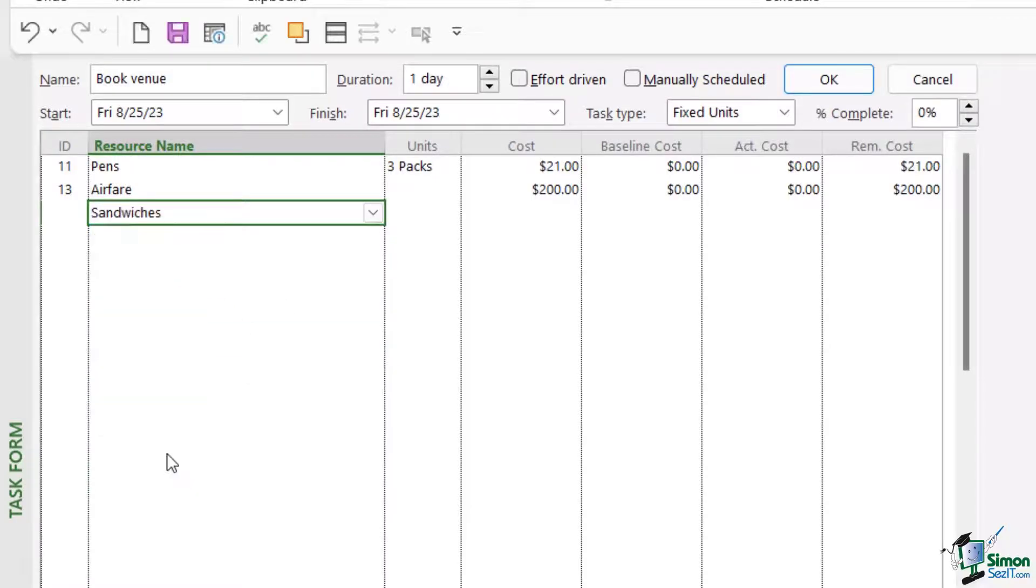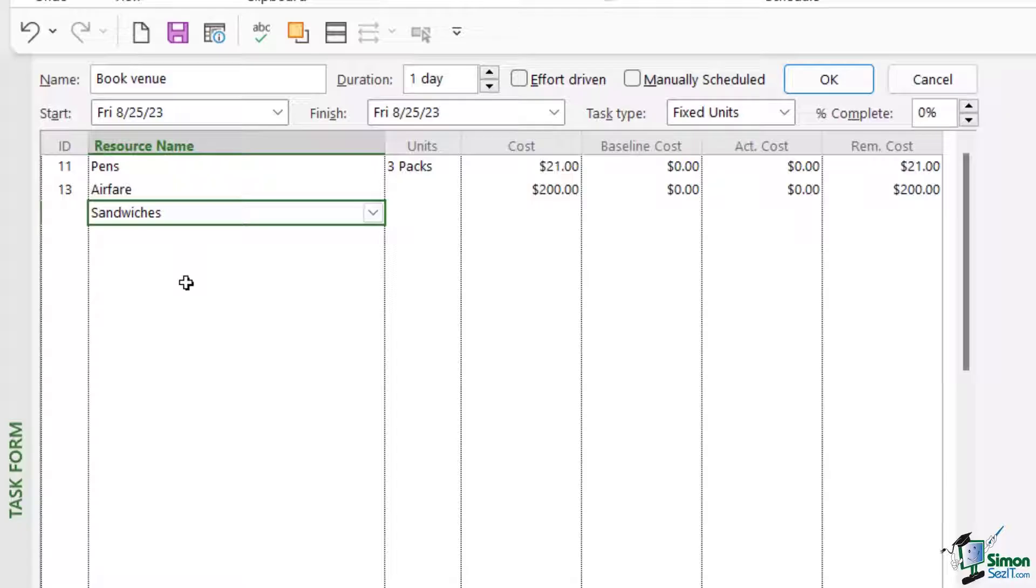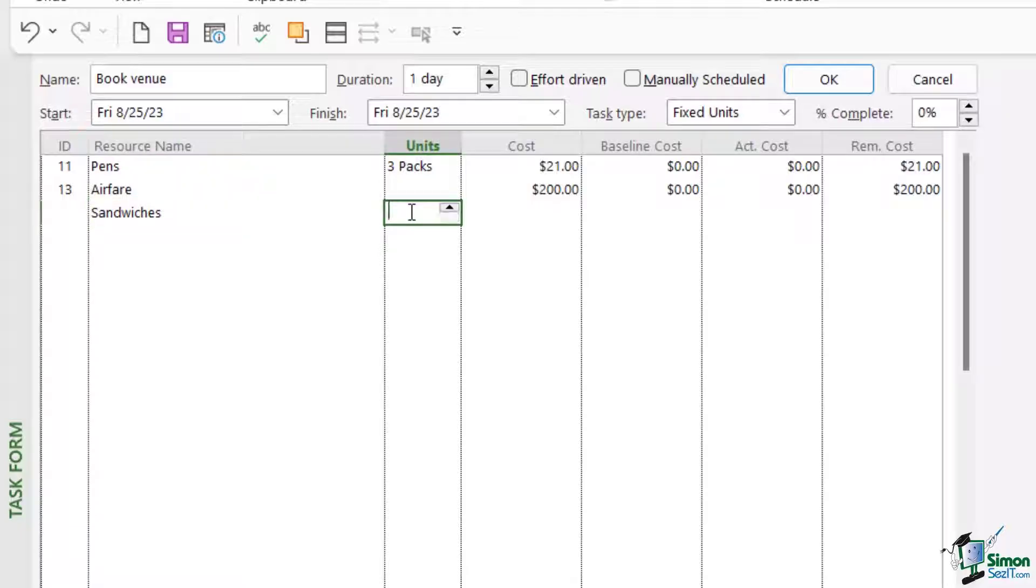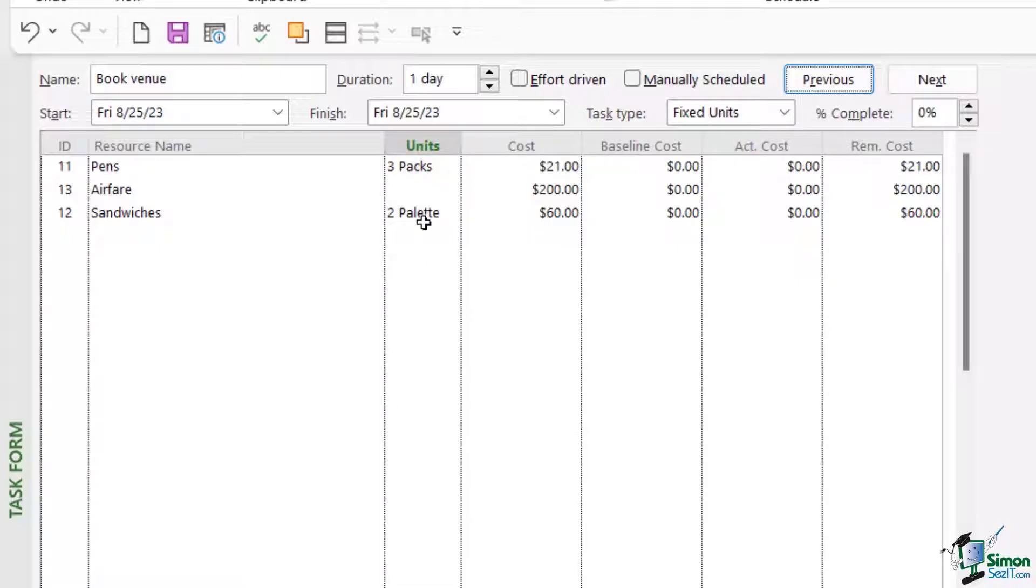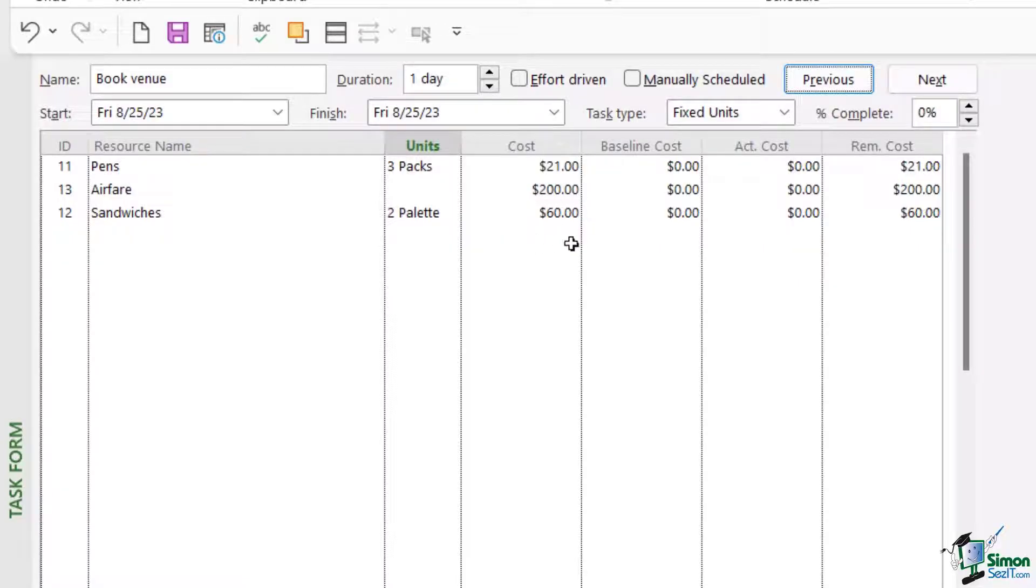When I book the venue, I want to make sure that we have some kind of lunch organized for the delegates and we're going to need a few sandwiches here. So I'm going to request that we have two packs of sandwiches. I'm going to type two into the units column and notice what happens when I click on OK. It adds the material label, in this case two pallets of sandwiches, and it also updates the costs. So I can see that two pallets of sandwiches is going to cost $60.